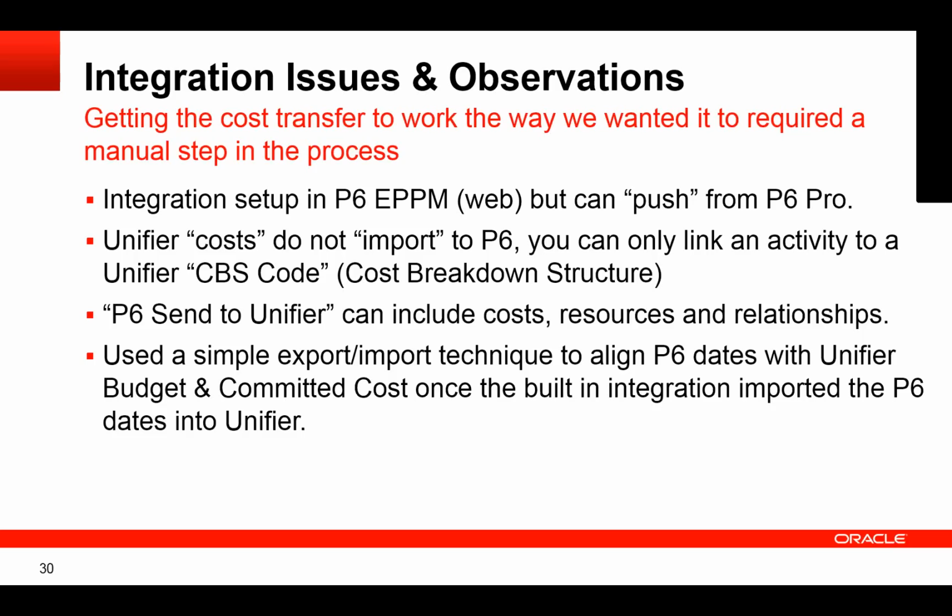Okay, so in this setup, we pushed information from P6 Web. It's an EPPM database. There was a question about whether you could hook it up in Pro, and no, it has to be an EPPM database to do the link, but then P6 Pro could be linked to the P6 EPPM database and do the push from there. But the initial setup has to be in an EPPM database.